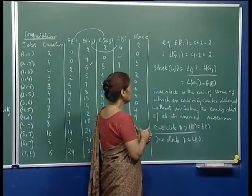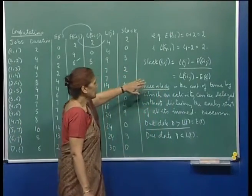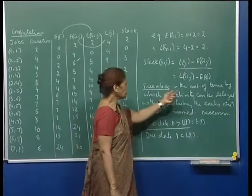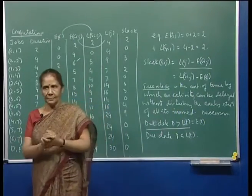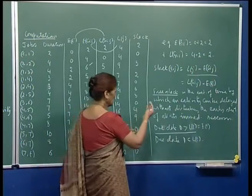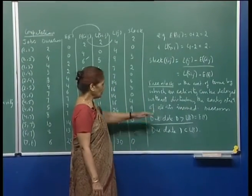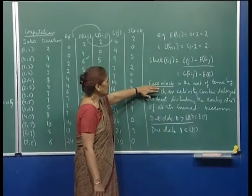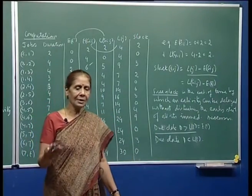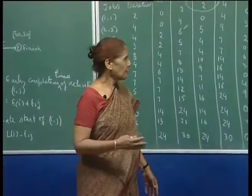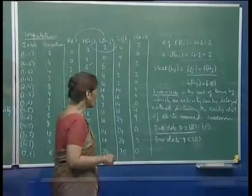There is also the concept of free slack — the amount of time by which an activity can be delayed without disturbing the early start of its immediate successors. This is a finer tool for the manager who does not want to delay the early start of certain activities. The free slack for a particular activity equals the amount of slack that can be used without affecting the immediate successor.